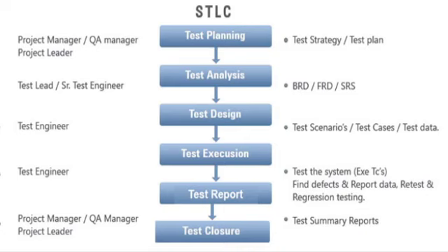Here, regression testing is nothing but testing the application for new bugs which may be caused due to fixing of previous bugs. If they find new bugs, level 2 will repeat again, which is retesting and regression testing for the newly raised bugs. If retesting and regression testing are completed successfully, then the test execution will pass to level 3,